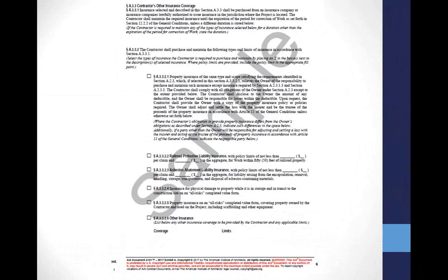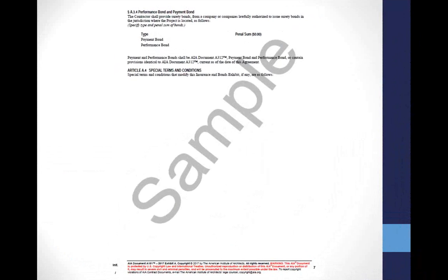a big improvement. Yeah, this one specifies the bond. And the default position is AIA bonds, as you can imagine. More and more common, folks have their own bond forms. Caution on that, right? You want to understand what the bond form says, because it's just as important as your contract, and they vary significantly.